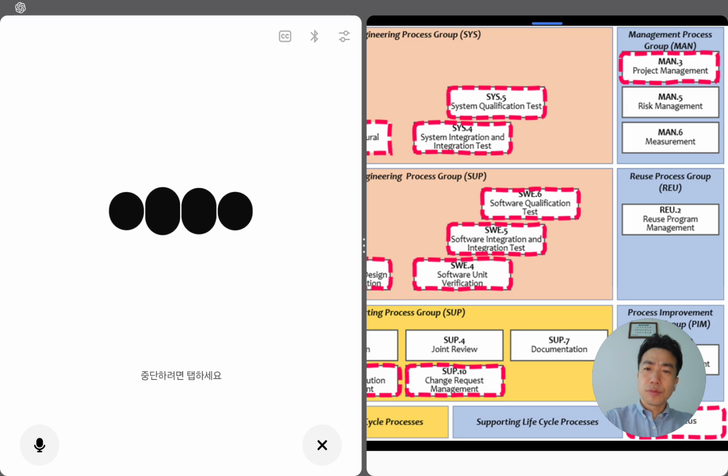Minimal rhythm that works, level 2 ready. Weekly: status report, schedule percent complete, earned value optional, defect and test charts, top 5 risks, blockers, decisions needed. Bi-weekly: risk review and CCB. Monthly: management review with trend charts and reforecast. Interfaces to other processes important in audits. SUP.9, your area: defects and problems feed risk trends and schedule impact, agreed defect thresholds trigger CCB or replanning.